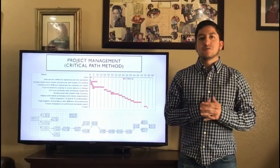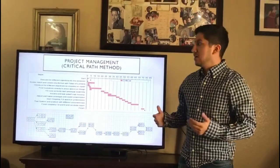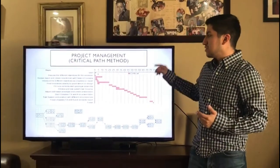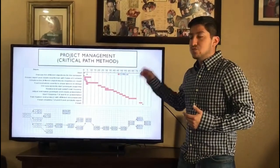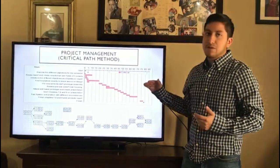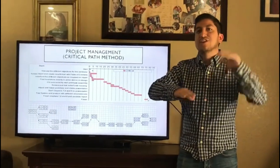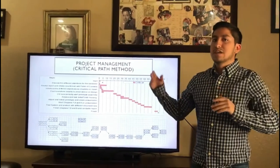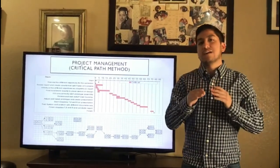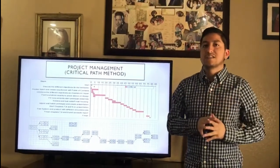In our critical path method, we mapped out the critical path that we have to take. The reason why these are all in red is because they're all critical, and in order for us to make the other ones, we have to follow each step. After we finish this activity, we have to go to the next. There are some that start at the same time because they don't have the same predecessors.